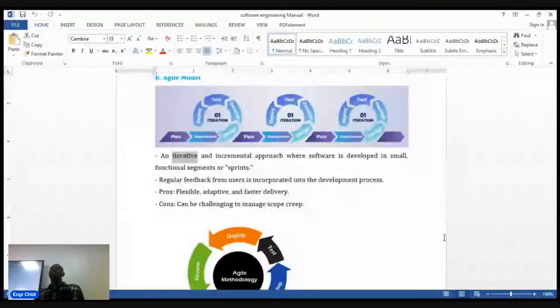The hostel is. So with Agile method, you concentrate on the hostel part, finish it first, and deploy, so that they will continue using it while you are now doing the result part, which will come at the end of the semester.